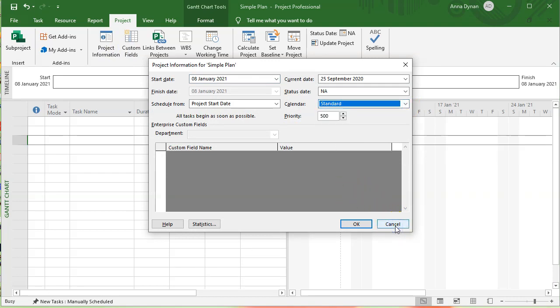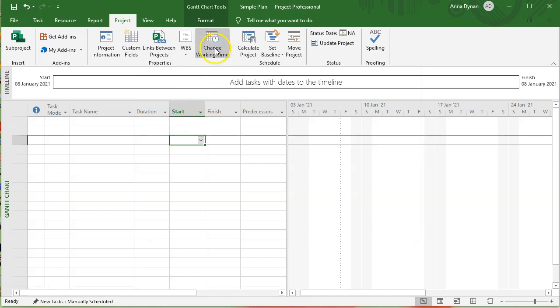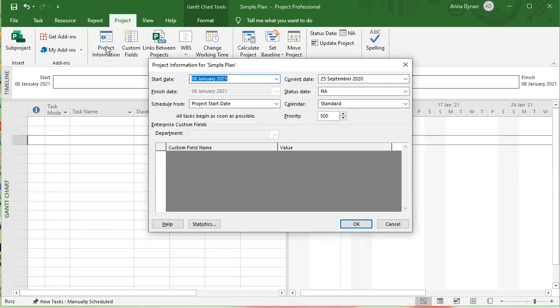Okay, so what I will do actually is I'll get you to write that. We're going to turn back the page, sorry, to page 9 of your notes, and you can just write a note there on how you link the calendar with the project. So you're after creating a non-standard calendar. So you're writing a heading, how to link a non-standard calendar, because the standard one is the one that's automatically linked with the project.